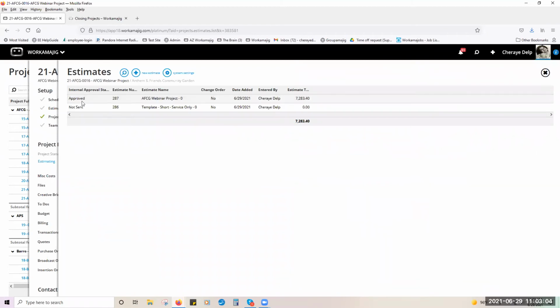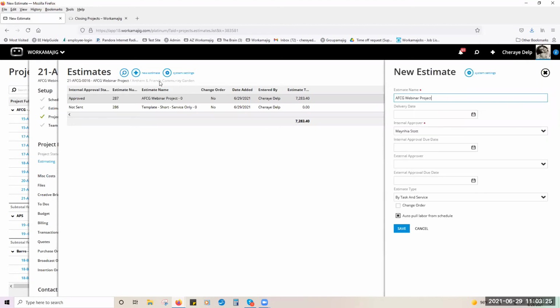Okay. So there may be times where you're working a project and maybe you have an unexpected expense that happens. At that point, we don't recommend you editing the original estimate. Again, you already have the one approved. So in this case, this is a change in scope. So here we have what's called a change order. So here I'm going to do a change order.